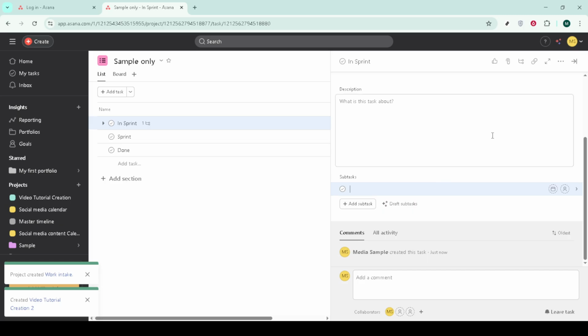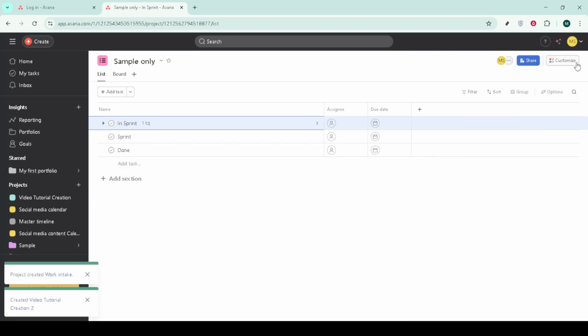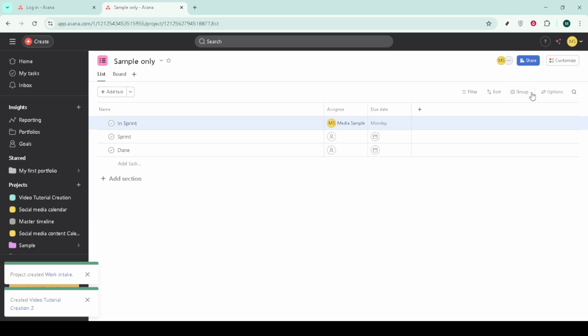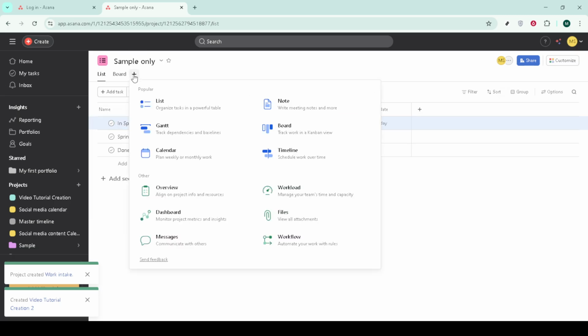Now put work into the system. Add features or epics as tasks and break them down into user stories. You can use subtasks for implementation details or create individual tasks for each story. Choose what best matches your team's reporting. Create a simple intake form to let stakeholders submit requests with the fields you need: title, description, priority, and any attachments. This keeps new work structured and prevents long meetings just to capture context.